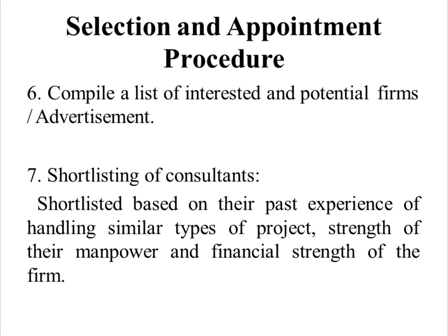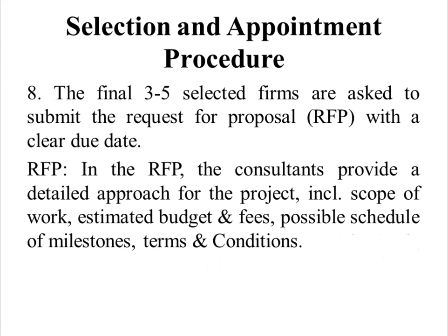Then we need to compile a list of interested and potential firms or advertisement. Then we need to do the short listing of consultants. The consultants are shortlisted based on their past experience of handling similar type of project, strength of their manpower, and financial strength of the firm. So on this basis, the consultants are shortlisted.